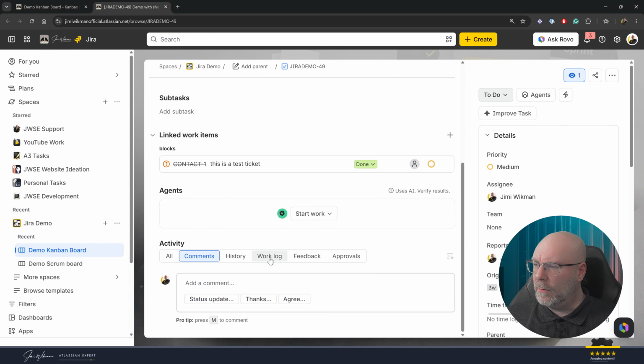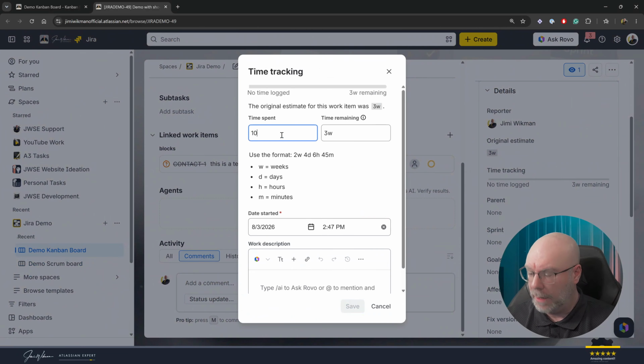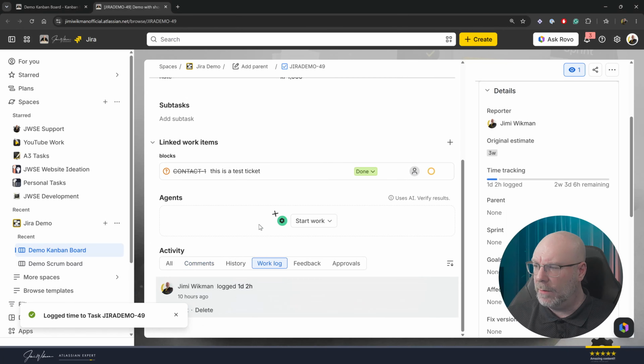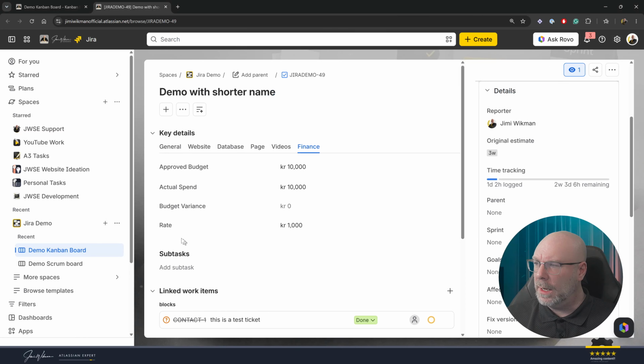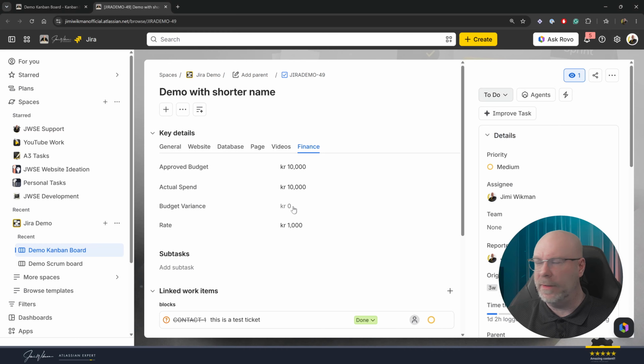Now then, let's log some time here. I can do that from the side here. Let's say that I log 10 hours. Maybe I need to say that's hours as well. So now I will have it down here in the work log, and I've added that one. And now I will have 1,000 multiplied by the number of hours. So I spent 10 hours, so my actual spend is now 10,000. And for some reason, the budget variance hasn't updated here. Oh, it has. It is 0.